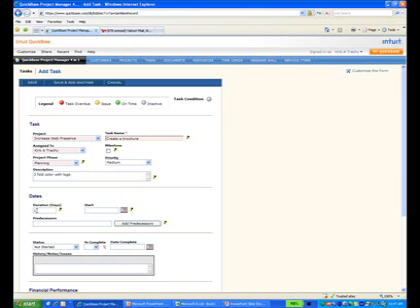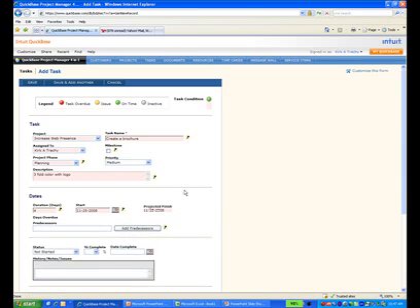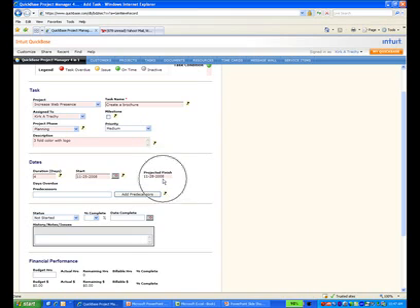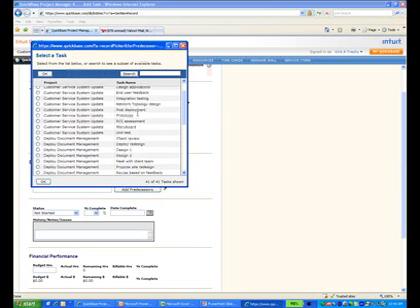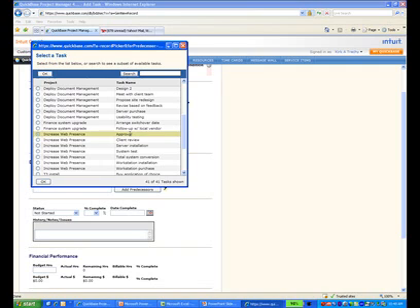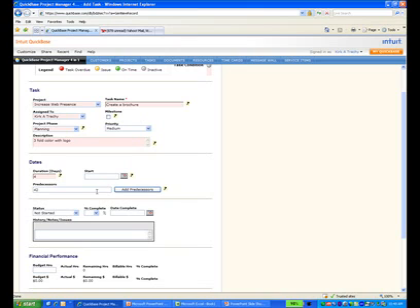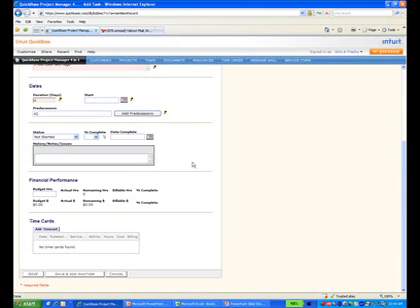And let's say it's going to take 4 days to do. And I could put a start date in here. Definitely can, and it figures out when the projected completion of this is. But what if it hasn't been approved yet? And I don't want to start something without getting an approval, so why don't I use this? This is a part of building your critical path, I guess you could say. Here we're looking for the approval, so I'm going to select approval. You can select as many of these as you want. They don't even have to be in the same project, but this has to be satisfied before we get a start date. So that'll be calculated in just a second here.